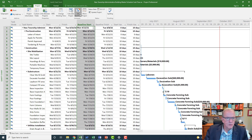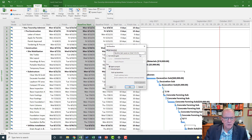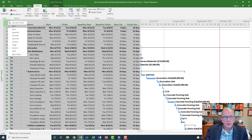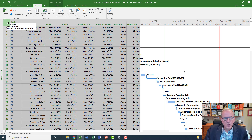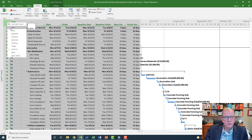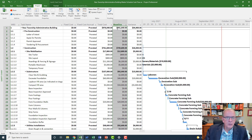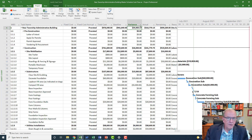I can also check that by going to Set Baseline, and I can see it was last saved recently. I would have had to set the baseline before I did the updates so I could see the variances. Under the cost screen — and I always like to right-click the square icon to switch screens — we have a baseline of $941,000 and we currently have a costing of $976,040.